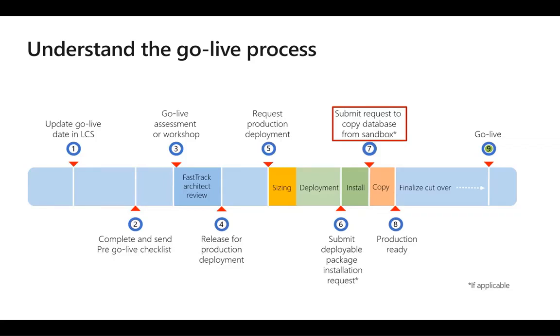Once requested, Dynamics Service Engineering (DSE) will copy the production database and make it available in the LCS project's asset library. Note that it might need 5 hours lead time and result in 2 hours downtime.